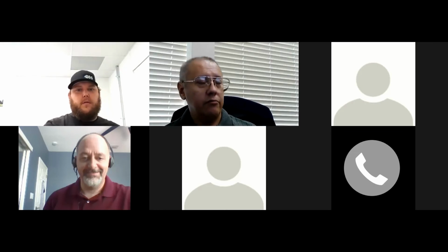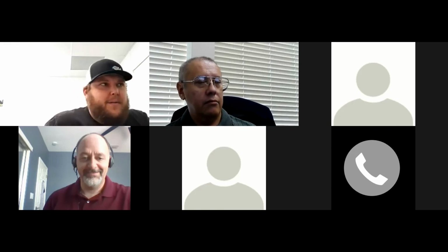Did you want me to change that one then? I think so, because we're contracting it out. So yes, like Jess said, overtime technically doesn't directly apply. I think if anything, we're not accounting for any change orders or additions or adjustments. So you're looking to implement a firm fixed contract. Yes. And if they have to go overtime, that's their problem, not yours. Right. So we should just take that one out then. Take it out, or instead of overtime, just say change orders, additions, or adjustments not included.